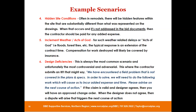Inclement weather and acts of God — floods, forest fires, and even strikes are covered under what they call force majeure. These uncontrollable actions cause the project to be delayed. Typically the claim will simply be an extension of contract time, and quite often compensation for destroyed work. A forest fire or flood should be covered by builder's risk insurance.